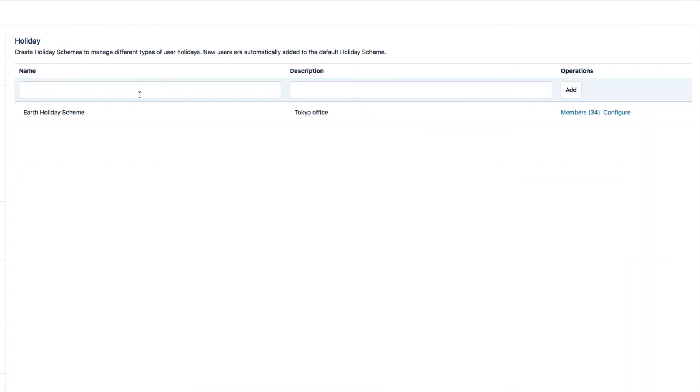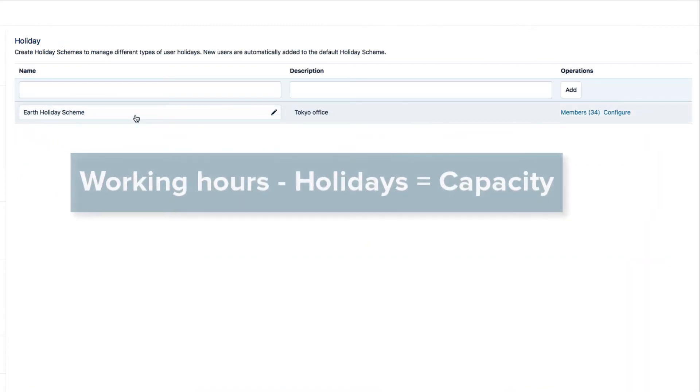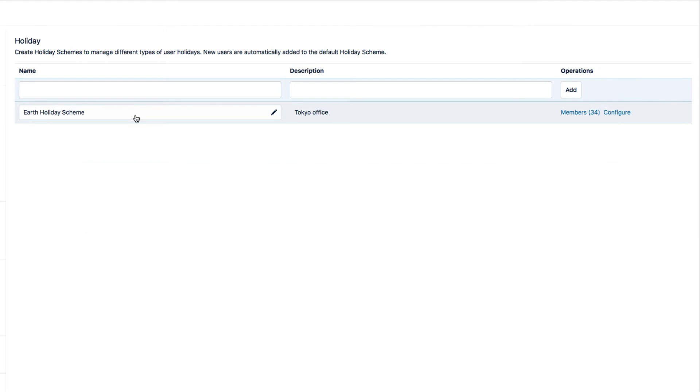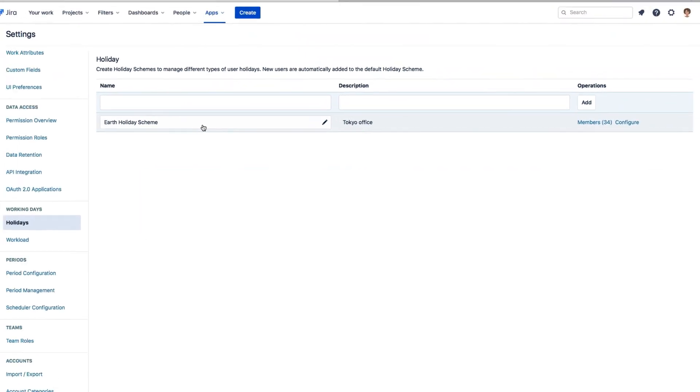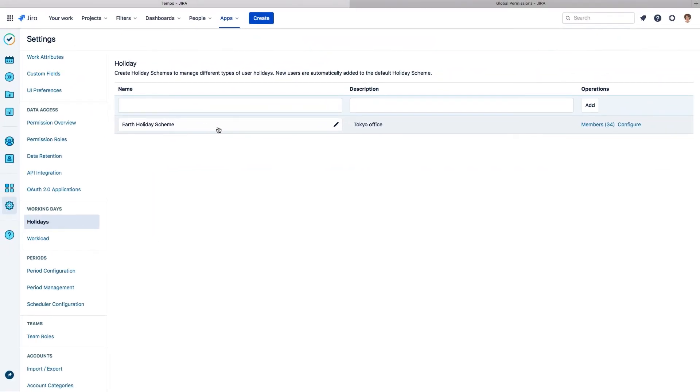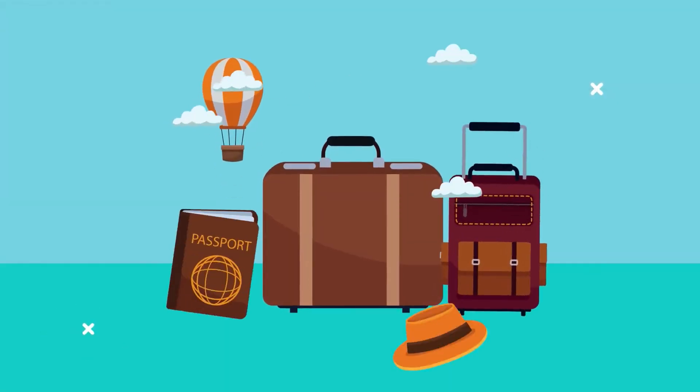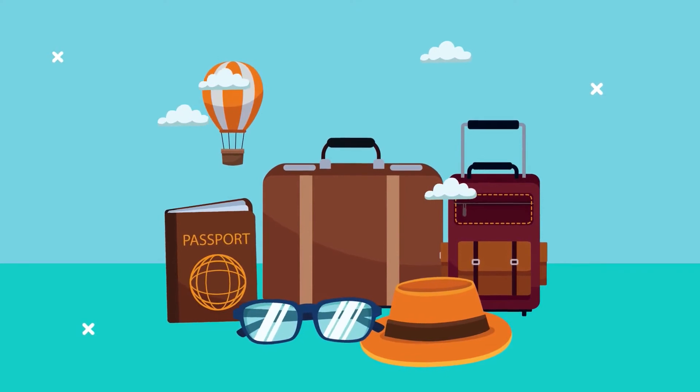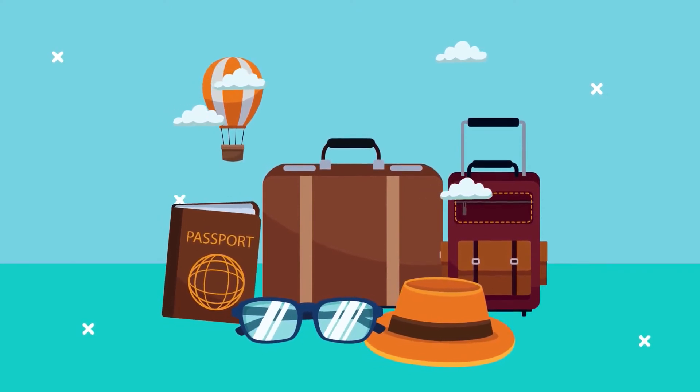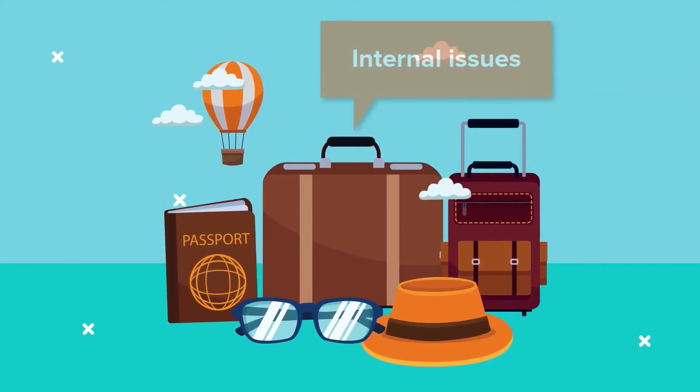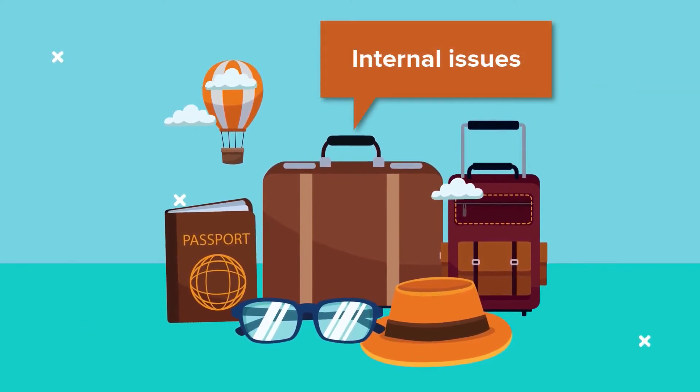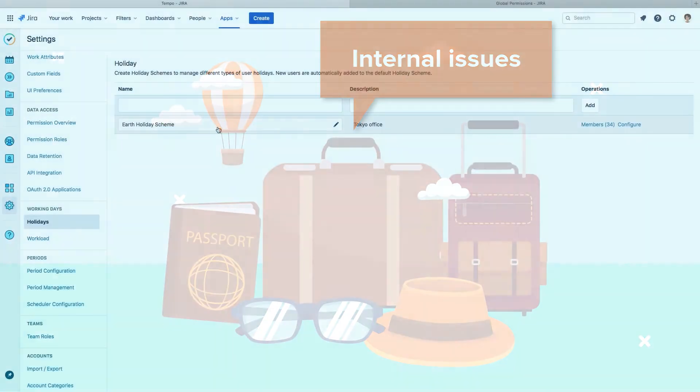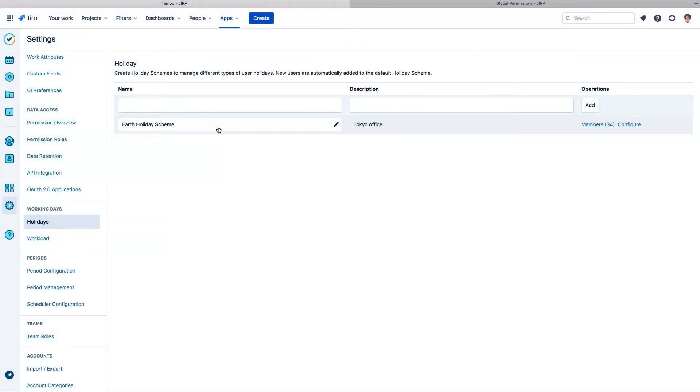Holiday hours are actually subtracted from the required working hours, so the resulting number of days is known as the working capacity for each employee. One thing to note is that holiday schemes are not meant for vacation days or personal time off. Those should be planned or logged using internal issues that are meant for that purpose. And I'll show you how to create these issues in another video.